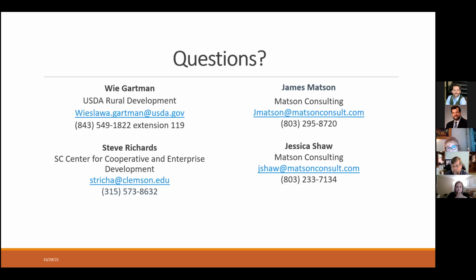Thank you for all the answers. Appreciate it. And the other thing I want to be sure to say is, remember, you can't start accruing expenses until the day that you signed your grant agreement. So you can't go back into the past. You have to start from whenever you signed your grant agreement, within the past month or so. That's when your expenses start. That's when your calendar starts for expenses.